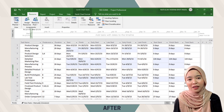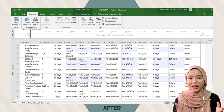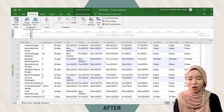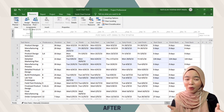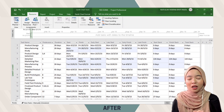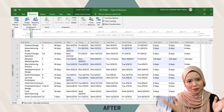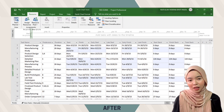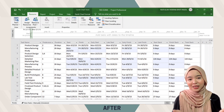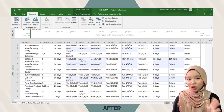The 179 days of slack on the detailed marketing plan were cut down to 134 days only. Lab test prototypes went from 5 to 0 days, while the manufacturing process went from 55 days to 10 days. The audio components task remained at 27 days of slack and did not change.